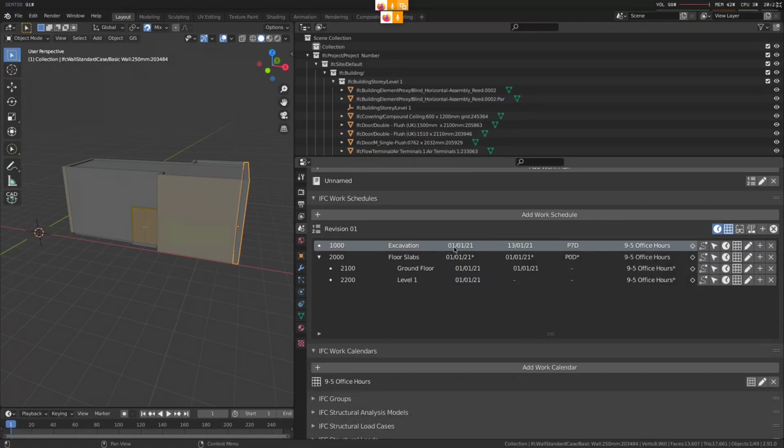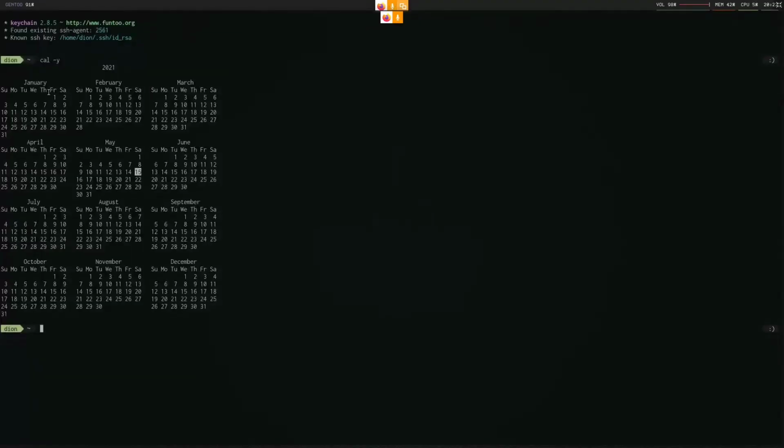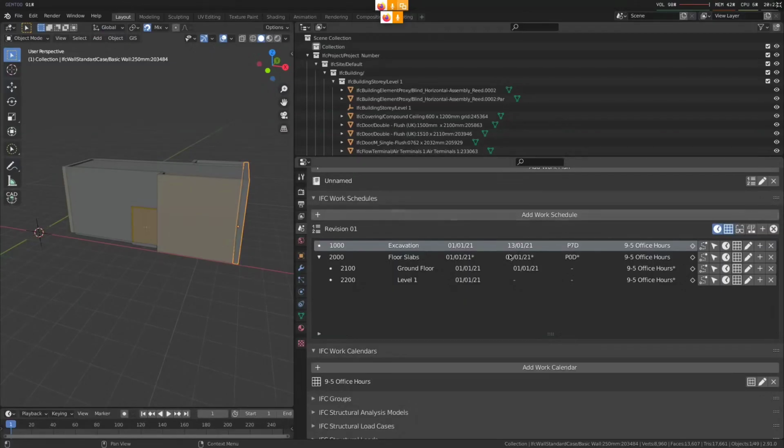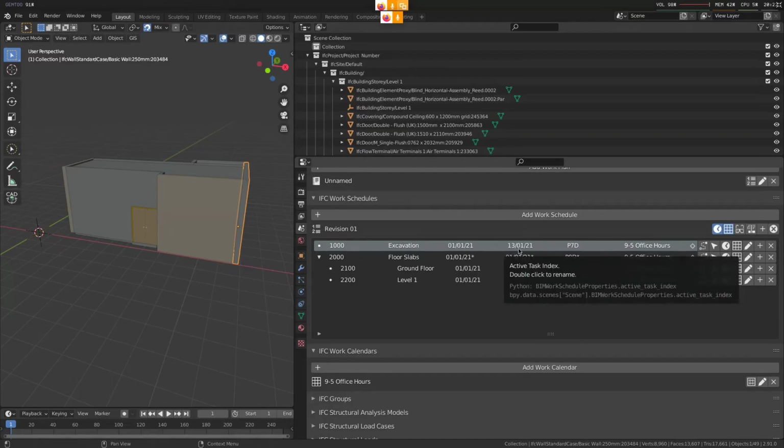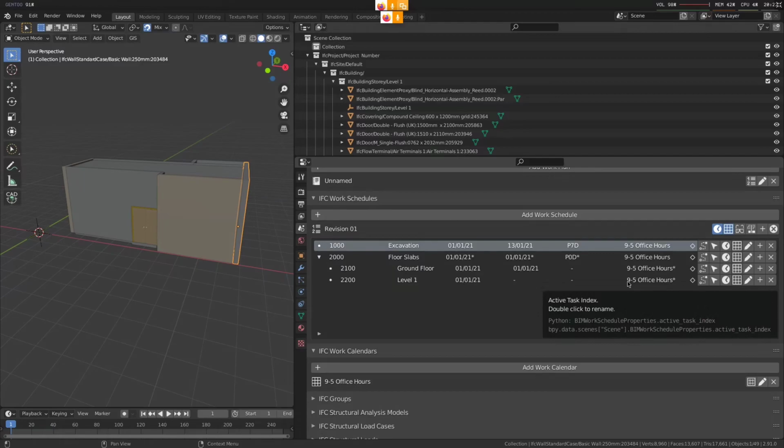Because we're 1 plus 7, which is 1 week, 8. Oh, sorry, but the first holiday, that's right, so the first count. So we're on the 9th. I'll have to check this. Let's see, so this one's a holiday. Then we have 7 working days. So that's 1, 2, 3, 4, 5, 6, 7, and then you end on the 13th. So yeah, I did it correctly. It's a bit unintuitive, but it is correct. Unintuitive for me. Maybe it makes perfect sense for schedulers.